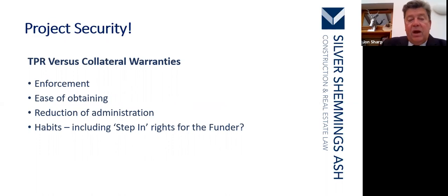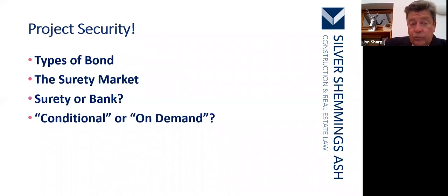TPR versus collateral warranties: enforcement, the ease of obtaining them, a reduction of administration and hassle, including step-in rights for the funder. Now, what we can do about that is we can have bonds, which can be placed in the surety market or by a bank, but you have to be careful whether you have a bond that's conditional or on demand.